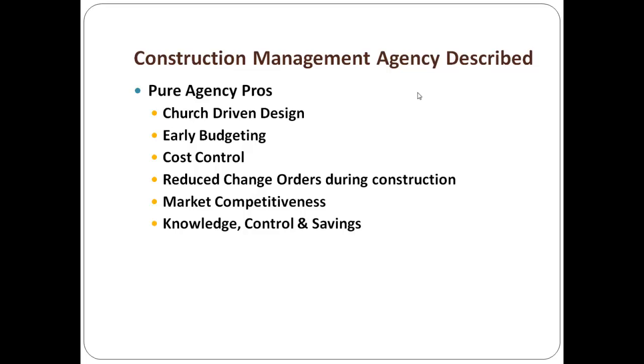But under construction management, because the contracts are with the individual subcontractors, now this builder turns around, and because he's managing it on behalf of the church, just as he would have managed it for himself had he held all the contracts and gotten the money, now the general construction manager is going to turn those savings over to the church.